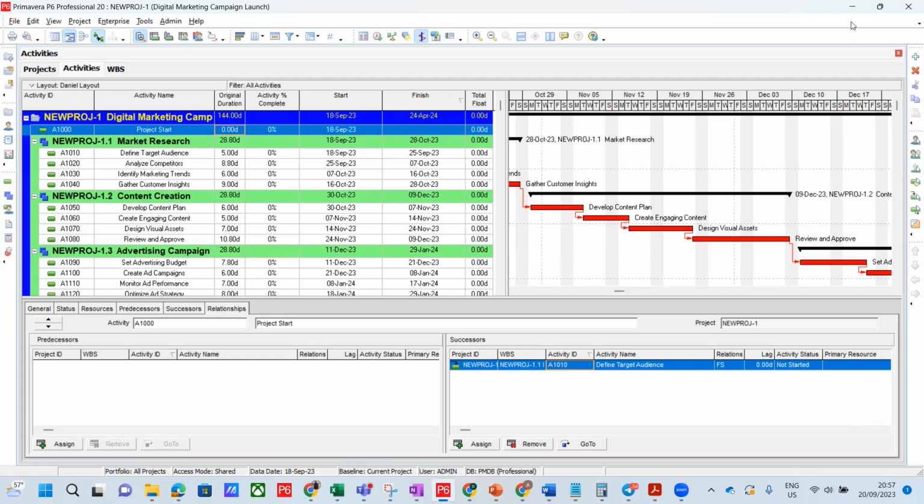And when it comes to material, they can say, okay, we do this in units or whatever measurement. If you're buying, so we are Cummins that supply diesel, or we are BP or Total that supply petrol or diesel for your generator. So we supply our diesel per liter. This is how much it will cost you per liter. So they have units of measurement, the three of them, right?